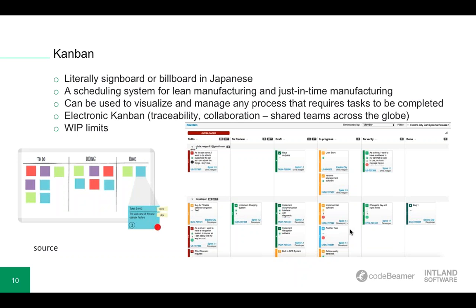Kanban imposes limits on the number of items that can be in a single column at one time, called work in progress limits, and they help you keep work flowing, complete your tasks, and save you time by eliminating too much task switching. Unlike in Scrum, in Kanban, the estimation of items is optional, so it can be left out. And after an item is complete, the team members simply pull the next item from the backlog and proceed with implementing it.